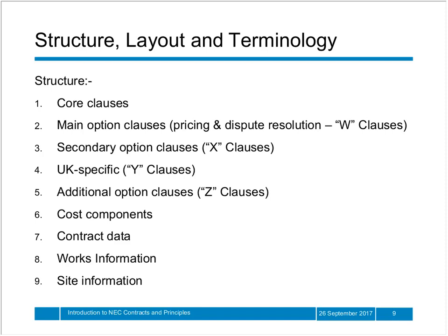through pain or gain. Option E is a cost-reimbursable contract, where the contractor is paid for carrying out the work plus a fee uplift. And finally, option F is a management contract, where the contractor is responsible for managing the design and individual work packages and subcontracts out the construction work. The contractor will be paid a fee as well as the cost of the subcontract packages.